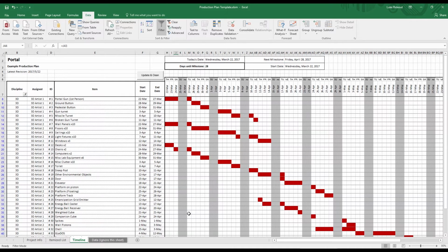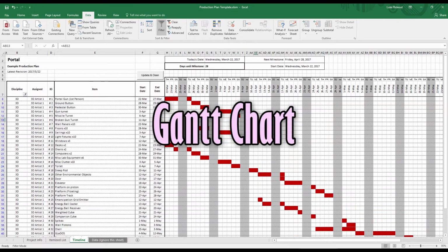Our producer and designer would, in this case, collaborate to create a timeline, setting start dates for each task, and the man-day costs associated would then set an implied end date thereof, which would in turn become the start date for the dependent task. This process would continue until every feature and every task is accounted for, and we have what's known as a Gantt chart, displaying an ideal development timeline.